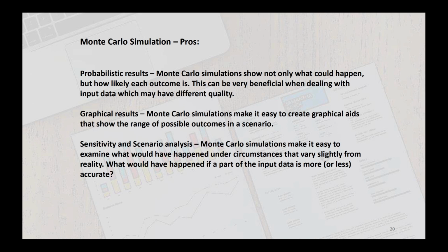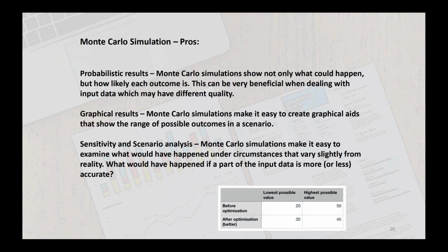After we have the first impression of the quality of our data and the first outcome of our model, we can search for the weakest points in it. This is called sensitivity analysis, and it allows us to find the scopes or areas where the data is less precise. So maybe instead of telling the client that you can be only 60 or 70% sure, because getting to 90% would require doubling the budget, we may say that it's better to improve some areas of our data. For instance, we do our homework and go to the land surveyor, do some measurements, or prepare some foundation design, some ground survey, something which allows us to be much more precise in those fields. So after another iteration of our model, the values will be much closer to one another.